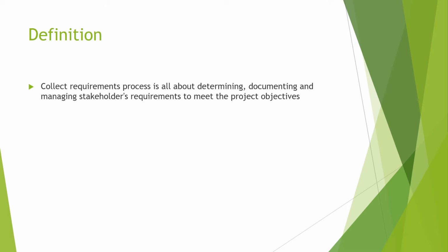Project requirements can come from the sponsor, project requirements can come from the users of the product of the project, right? Project requirements can come from your own project team as well, right? So let's say you're doing a certain project. Your designer may come up and tell you that there is a way you can enhance the functionality of the product of the project, and that is a requirement. Whether you accept it or not, whether you take it to the sponsor, whether you take it to the folks who have the authority to accept requirements, that's another thing, right?